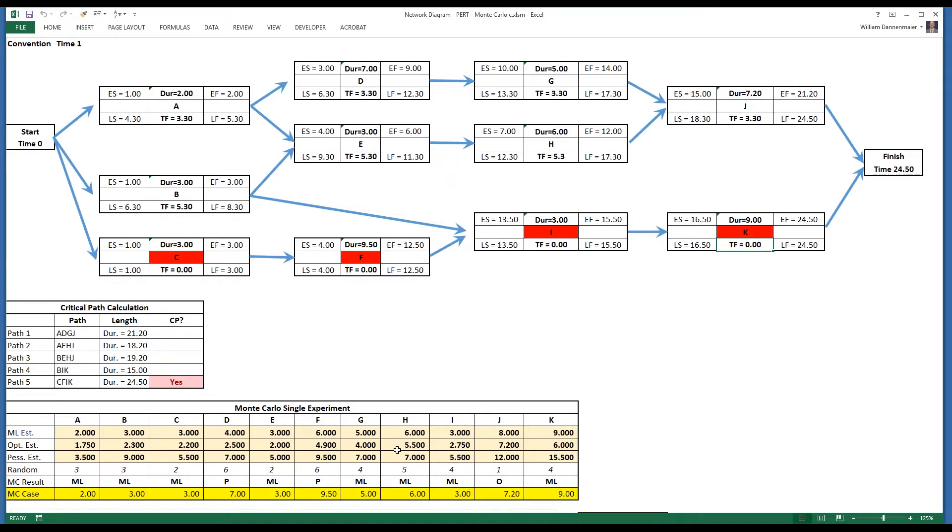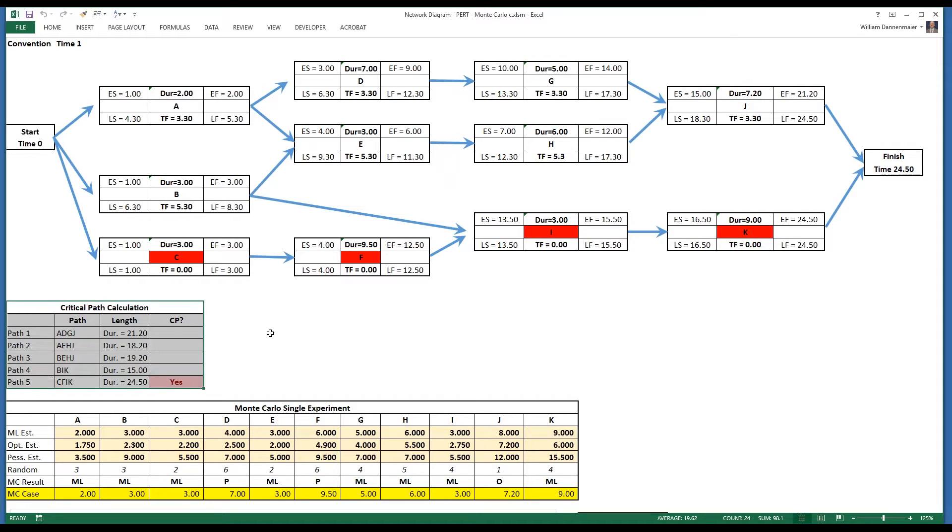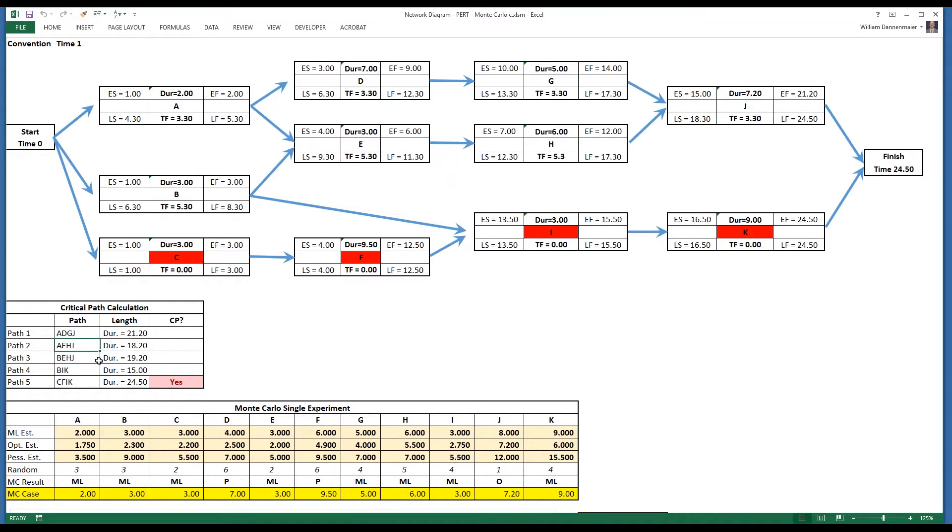Below the network diagram is a simple calculation of the durations of the paths on the project. There are five paths in this project: ADGJ, AEHJ, BEHJ, BIK, and CFIK.